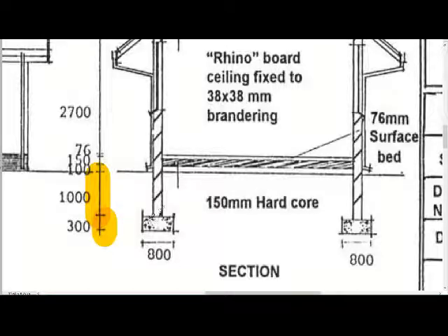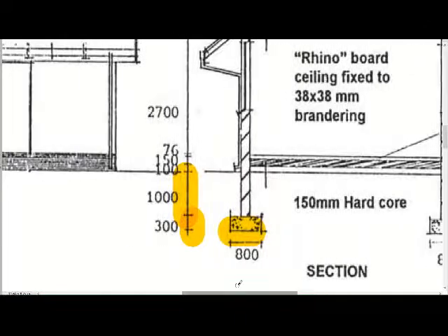Okay, so whenever you do your measurement in your bills of quantities, your excavations will be in cubes and not in meters like what we're measuring now. Then you will times it with your total length, that's 36 meters that you measured, times 800 mils times your height. So it's always length times your breadth times your height. That's usually the way to stagger it. It just makes life easy whenever someone else takes up your measurement. Okay, so that's more or less how the measurement works.